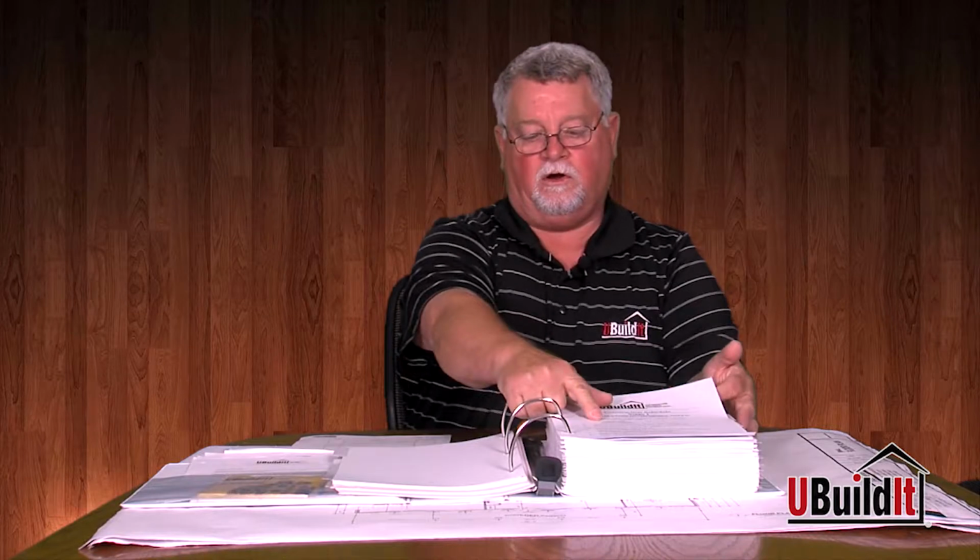So again, managing expectations, this goes back to expectations there. Don't expect it to come back in 4 or 5 days after I've told you it could take up to 3 weeks. So be patient. Some of the hardest part of starting the project is the starting of it, is getting things done in order. Step 2, set up an account with a lumberyard, a concrete supplier, and an electrical co-op.